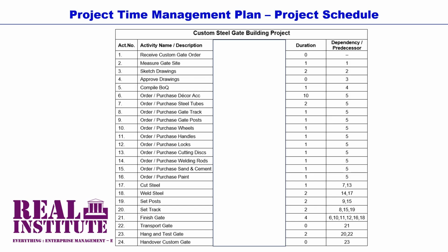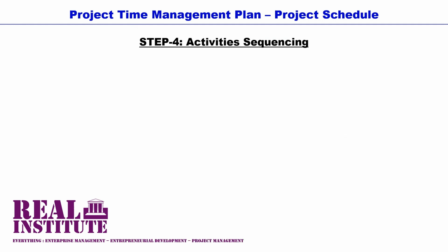Then, when all the project activities' dependencies have been determined and finalized, the project activities can be easily sequenced into a timetable or plotted on a chart or listed in a tabular and chronological order in a project schedule. Sequencing is a function of primarily the succession or the dependency of the project activities, and of course their respective durations. However, the project start date is key.